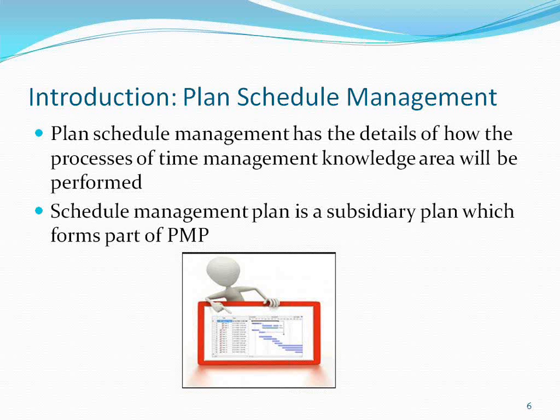So thresholds. As a project manager, in the schedule management plan, you will plan all these things. Like as a project manager, at what point in time you will poke your nose, you will pitch in to control the schedule of the project. Threshold. If there is a delay of 5 days, then I will go and control. If there is a delay of 5 minutes, then I will go and control. So when a project manager should go and control the performance of the team.